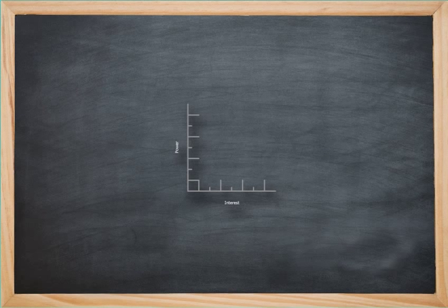We're going to show power on the left side, 1 being lowest and 7 being the highest, and interest, 1 being the lowest and 7 being the highest. Let's go through 2 examples of stakeholders. One is stakeholder D. Her name is Darlene. She's a senior manager of another organization. She has her own projects to deliver, and she is somewhat interested in the success of the project. She does have the power and the ability to pull strings or to help resource-wise if necessary. So we're going to evaluate her. She has the power of 4, which is roughly here, and the interest of 2. So there, we've placed her.